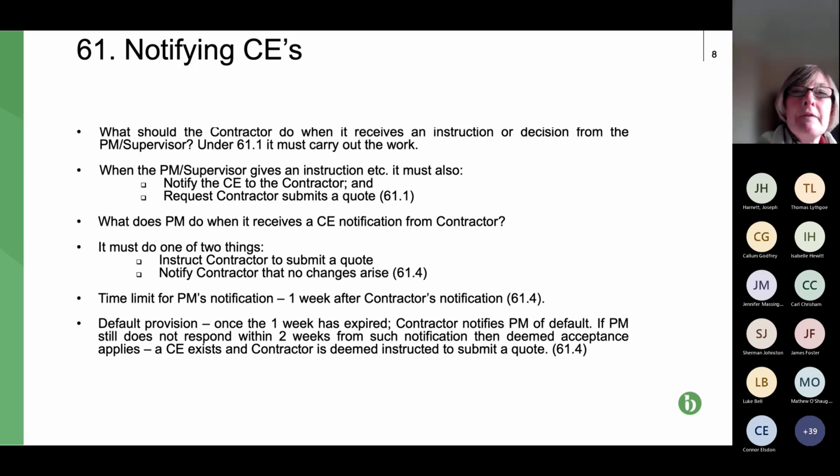There's nothing specific in NEC about what to do, except of course in either of those scenarios, the contractor can proceed to adjudication, but very often that's not practical on single CEs, and very often the contractor's busy actually physically doing the work, so hasn't got the time to devote to an adjudication.